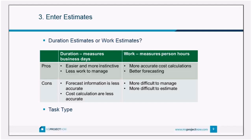Don't get too attached to your task types, because at one point or another when you're making revisions you'll likely need to change them based on how you want Project to recalculate values. One of the biggest complaints I hear: 'I remove a resource and my duration is suddenly a thousand days' or 'I change a duration and my resource is assigned at 500 percent.' That is entirely caused by task types. Master the task types and you'll eliminate a lot of headaches.